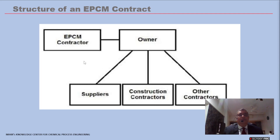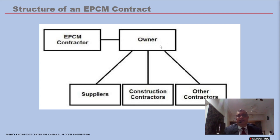In the EPCM model, the owner is responsible for placing orders on all suppliers and construction contractors, while the EPCM contractor acts as the owner's right-hand man. The risk to the EPCM contractor is much lower — only man-hours are at stake. If the owner wants to change the P&IDs, a change order can be raised for man-hours and effort, but the cost is borne directly by the owner. This means some degree of gold plating and changes can be accepted by the EPCM contractor, unlike in an EPC arrangement.